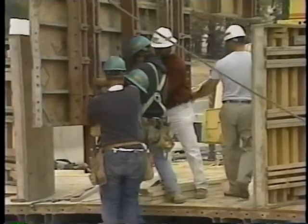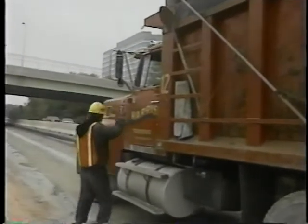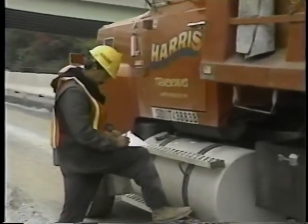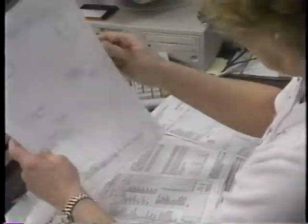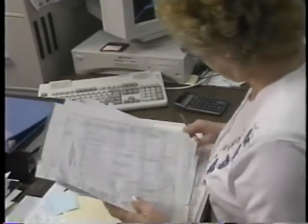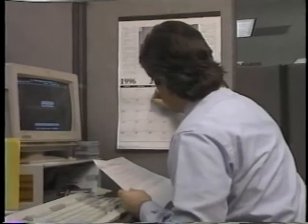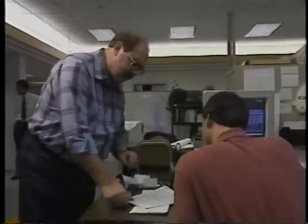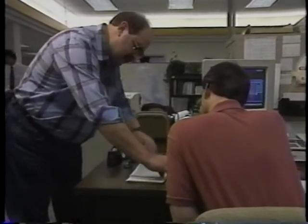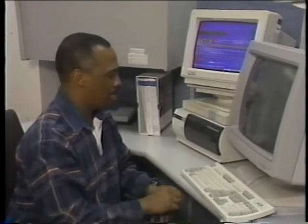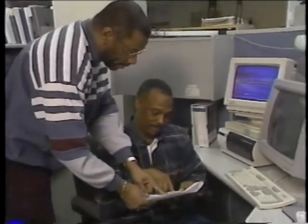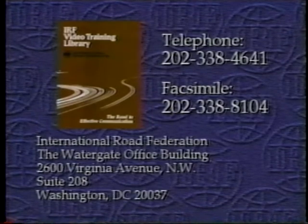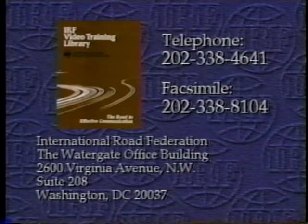In this program, we have covered the procedures for manpower budgeting and scheduling. Manpower is planned by activity or activity group, and planned manpower may be computed in terms of man-hours, man-months, or other time periods. Manpower can be distributed using either planning activities or staffing activities, and there are a number of manpower distribution methods: equal distribution, prorating, and engineering judgment. For more information on this or other IRF videotapes, write to the International Road Federation or call the numbers on your screen.